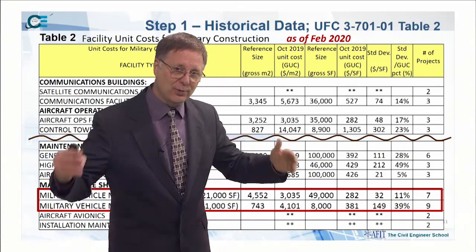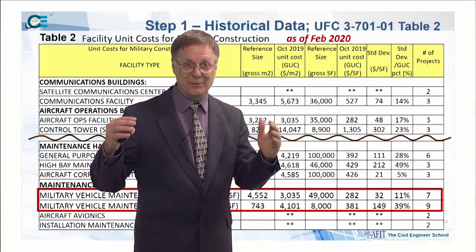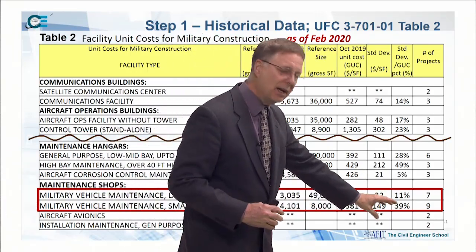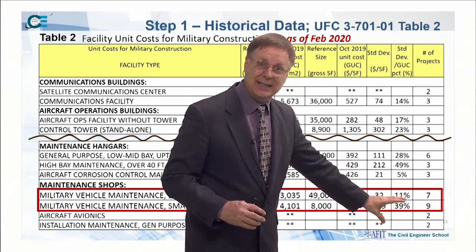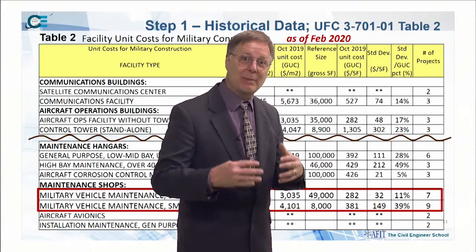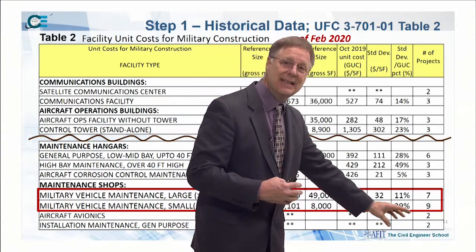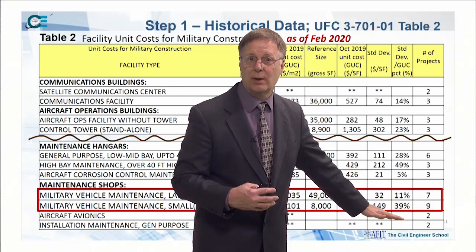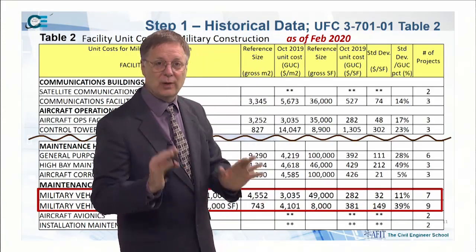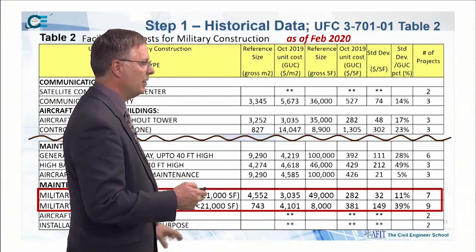And then you take it 2 or 3 standard deviations, dare I say 6 sigma, if you're familiar with that term, and you're way out there. So just realize that what this is telling me is that this is not very accurate data. I want to emphasize that mainly because that whole plus 50 minus 30, that's not something I'm making up, folks. The data itself, where we got these costs from, is telling us right away it's not very good data. So it's got to be used strictly for planning purposes. We need to communicate the levels of accuracy along with this.